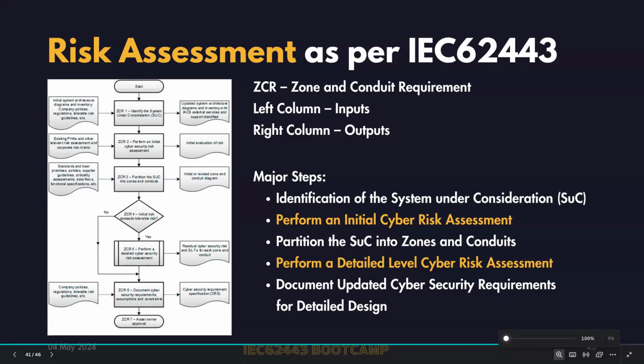And there is one more thing: once you have done the initial risk assessment, the customer may ask you to conduct a workshop for a week or 2 weeks, to go through whatever you have identified and whether the ratings you have given are right. Whether you have taken a quantitative or qualitative approach, most of the time it is quantitative, based on the risk matrix we have seen.